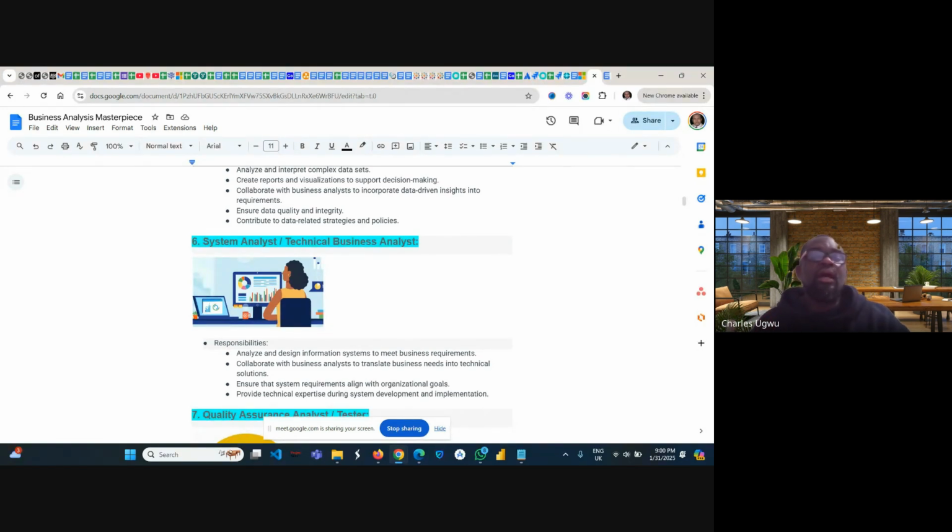Then another business analyst called a technical business analyst takes it up from there. That's where the product backlog and technical requirements start developing. Some of them are chunky, so you start breaking them down into smaller requirements called user stories and acceptance criteria, making them ready for implementation.